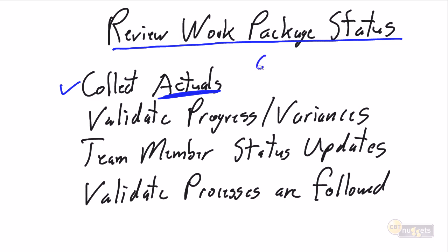Well, I spent 6 hours on the task. Good. Are you done? Ha, wishful thinking. No, Steve, I'm not done. Okay, how much time do you have left? I should have confidence that I can still complete this in the 10 hours. So the total is going to be 16 hours. So we're collecting the actuals, we're collecting their estimates to complete, and we're getting their commitment to get the job done.